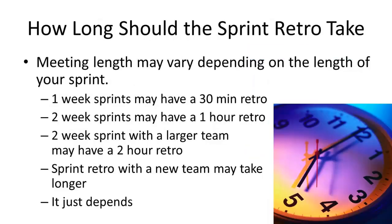How long should the sprint retro take? The meeting length may vary depending on the length of your sprint, the size of your team, or how long the team has been working together. You may have a 30-minute retro for one-week sprints, or a one-hour retro for two-week sprints. Teams that have been working together longer and have less change may only need a 30-minute retro once every other sprint. For new teams, they may need an hour-long retro at the end of every single sprint. It really just depends.